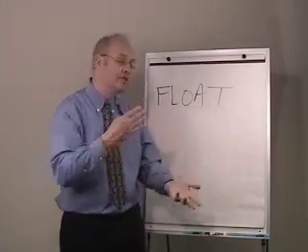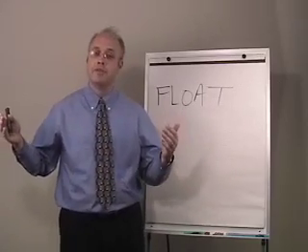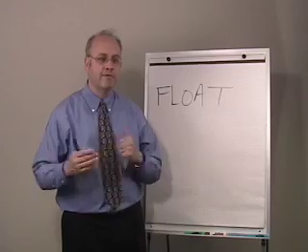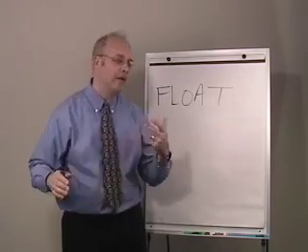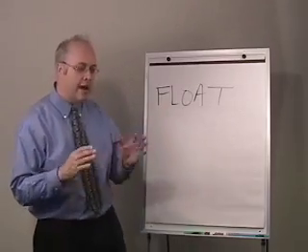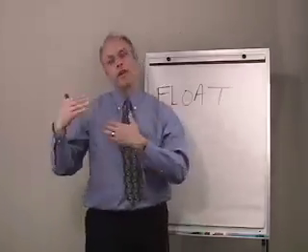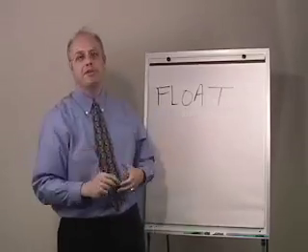Now, the amount of float that's generated for non-critical work when critical work is delayed will fluctuate based on the progress of those non-critical activities and whether or not revisions are made to the schedule and a number of other considerations. But the bottom line is, delaying the critical path of work can have the effect of giving float to other paths of work.